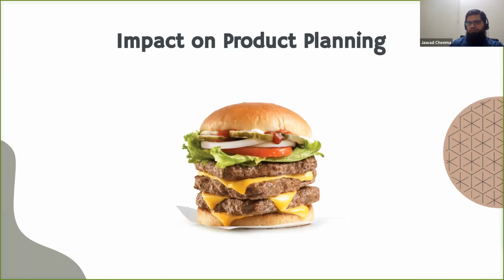So if you have heard of the Hamburger approach for splitting the task stories, right? Which is typically done in the agile. So whenever you are creating requirements, you need to think of it in a way that you can take smaller bites out of it, so that customers can enjoy each bite rather than the whole feature, right? So you divide them into different layers, divide each layer into different tasks, and group those tasks from each layer so that a bite can be taken and that can be released to the production.